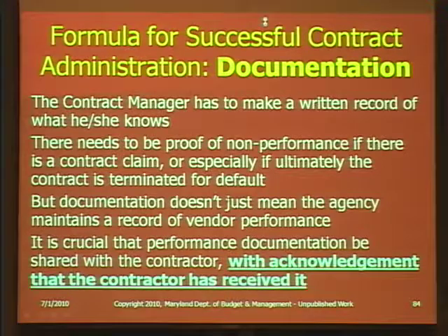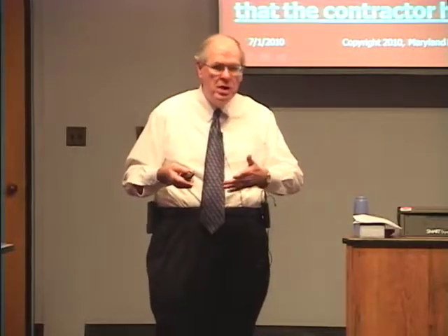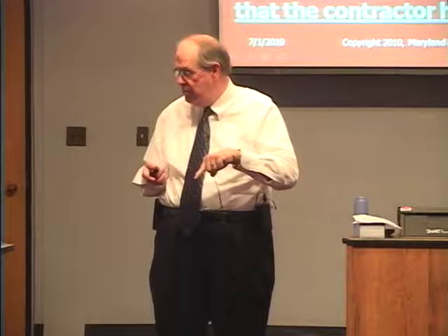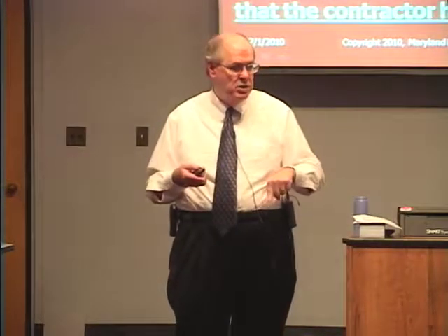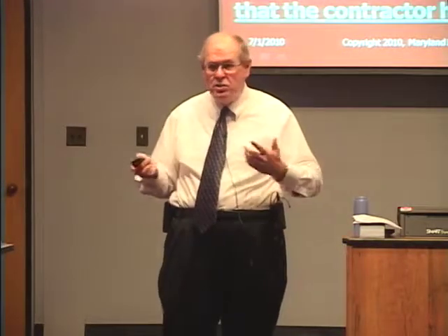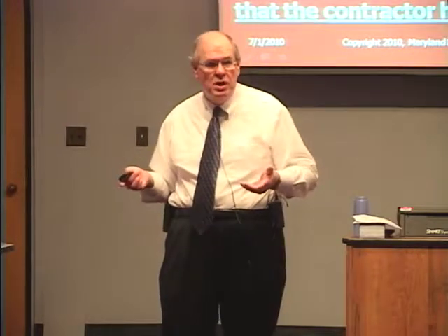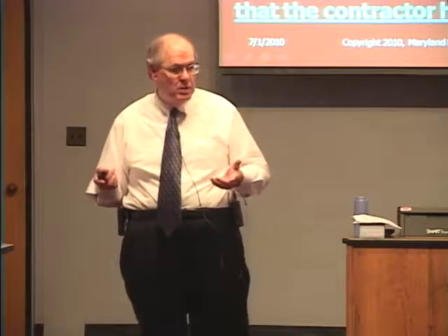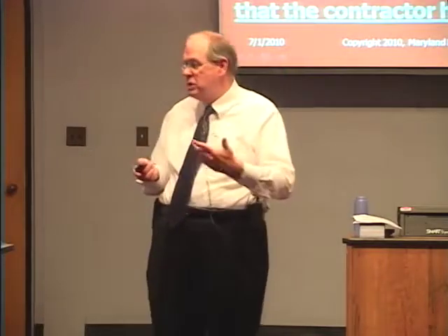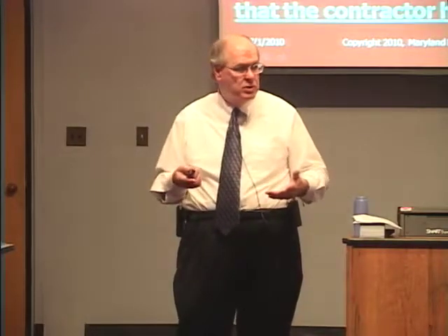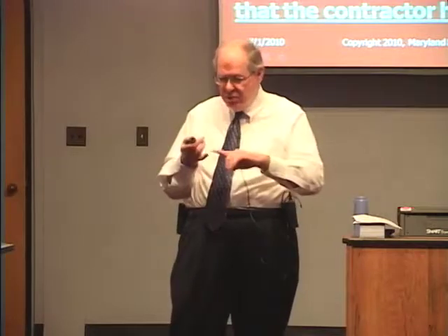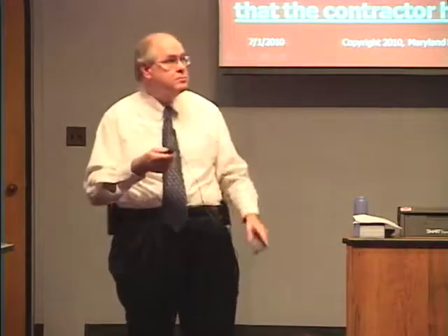It is crucial that performance documentation be shared with the contractor. The contractor has to know that you are saying it is not performing. Because if you have all kinds of documentation that shows they're not performing, but you've never told the vendor, you're not going to win any action either. If they're not told anything contrary, what are they supposed to know other than what they're told? And you may say, well, they should know whether they're doing the job. And they should know whether they're doing the job. But the reality is they need to know whether you know they're doing the job.